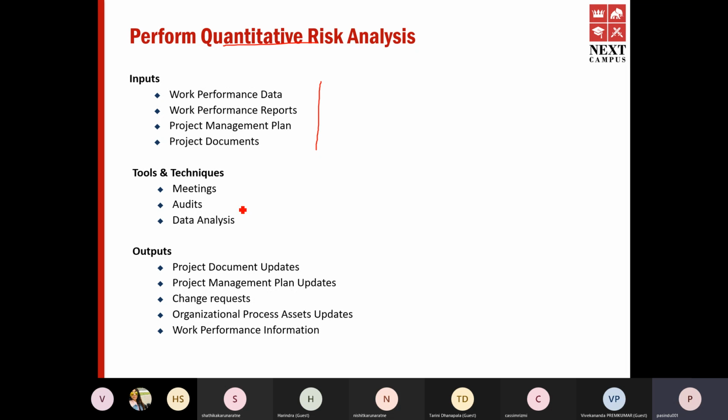The technology itself is new, and even when it comes to external parties, we could not get right knowledge from right people, because it's completely brand new. With regard to technology being new, we had to accept it. There's nothing we could do about it other than training, which we did. With regard to resources, we put additional resources and we started the project.